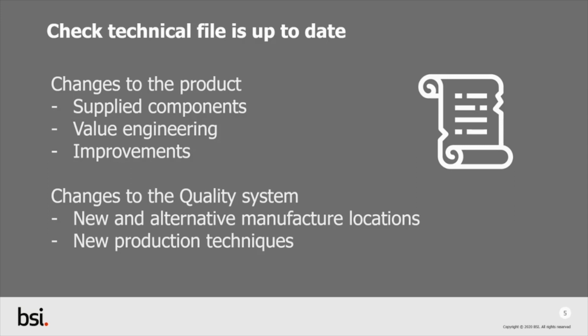If we do find an issue with the technical file and additional evaluation activities result, such as testing or a site visit, it's likely that the time to complete the project will be more affected by this discovery than had we known about it from the outset. This is because everything we do is scheduled and subject to a lead time before we're able to start. So if we find that we have to undertake some extra activities, these lead times will apply at the point in which these activities are assigned. All this will compound the delay of the necessary additional evaluation activities. So certainly I'd encourage you to check the currency of your technical file.